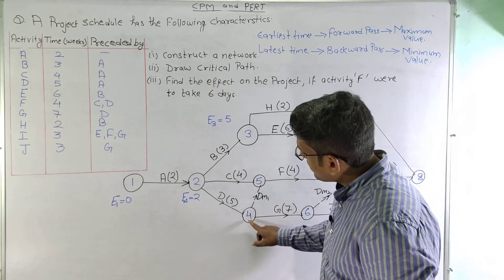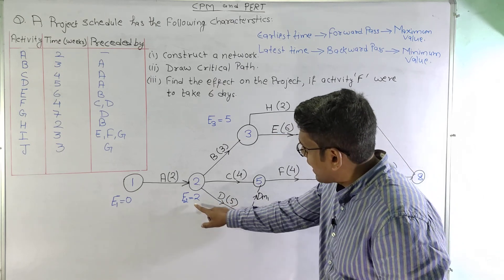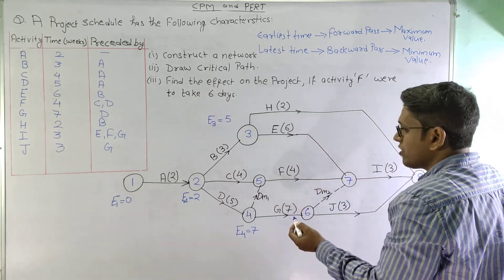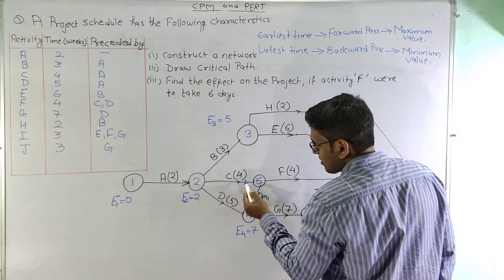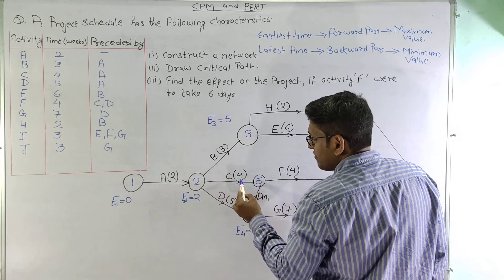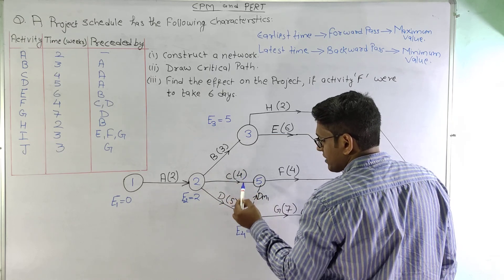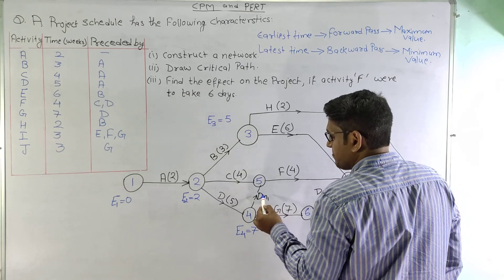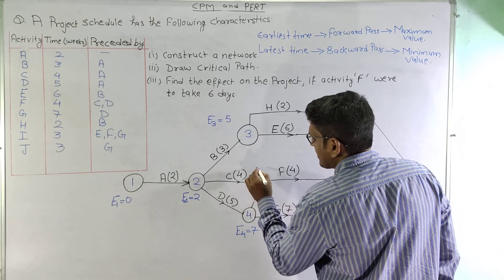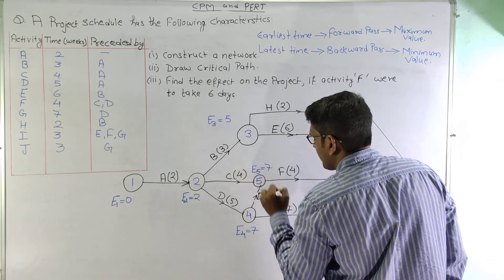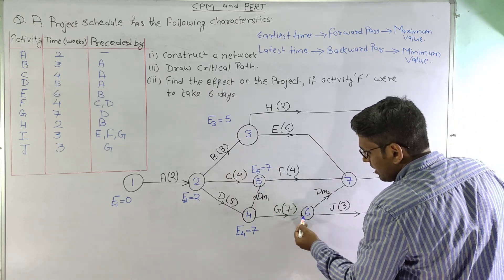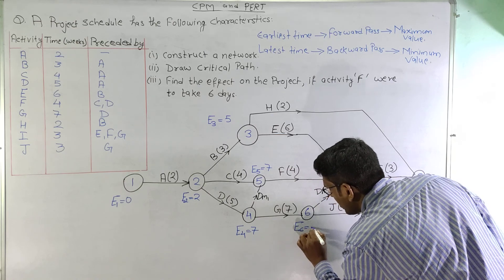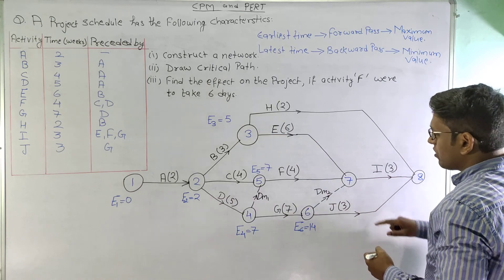At node 5, two activities are coming in. From the C-path: 2 + 4 = 6. From the D-path via dummy: 7 + 0 = 7. We select the maximum, so E5 = 7. At node 6, a single activity is coming in: 7 + 7 = 14, so E6 = 14.